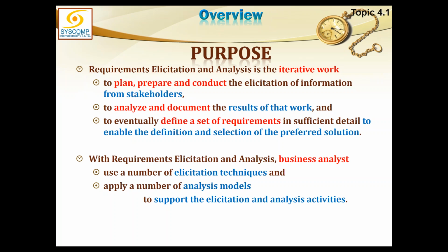I said that the process of requirement elicitation and analysis is iterative in nature. It is not that you elicit the information in the beginning and then you forget about it. You don't have to elicit it anymore. No, this is going to be a continuous process, and it starts with the business analyst, and the project manager continues this effort till the end of the project. The requirements will keep changing, and new requirements will keep coming. So we will keep eliciting the requirements, and we'll keep analyzing them, and we'll keep adding them to the project, and ultimately the project work will also keep getting amended. This is progressive elaboration.